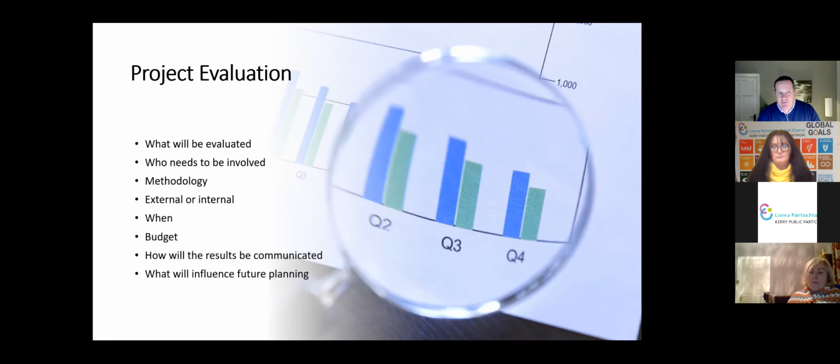I remember we did a project in West Limerick, a building project. The building was completed. Everything was paid out. And there was a major problem with the design. There was a huge design flaw within the building. I'm not a builder or an engineer, but it was obvious to anyone there was a problem. And they went through everything without it being spotted, because there were no ongoing meetings with the builder, with the engineers, nothing.